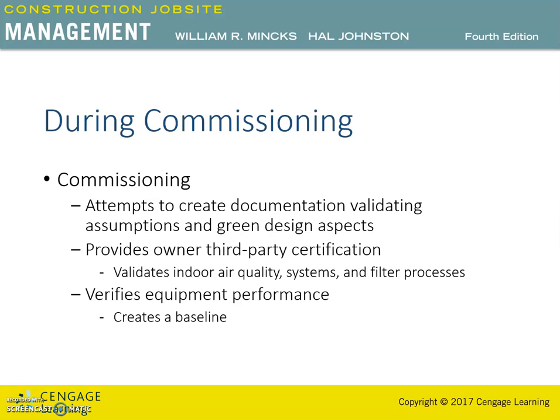It is a major part of the commissioning. The major part of the commissioning is the validation of the indoor air quality, the systems that provide the air quality, and the filter processes used in the building. So verification of the equipment performance and creating a baseline for continued performance checks are all done during the commissioning periods.